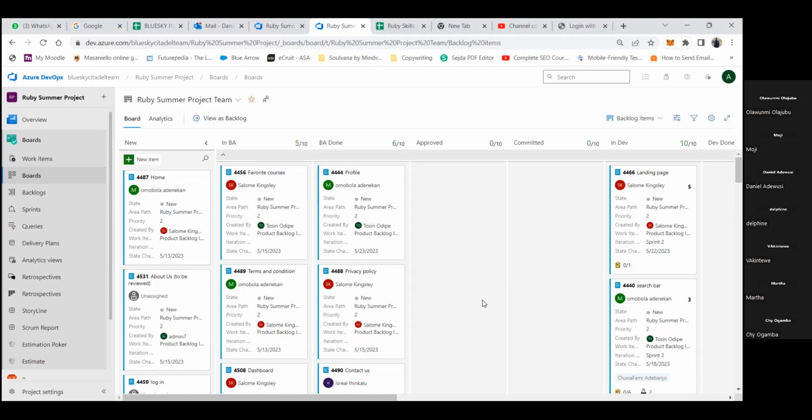Okay, that's what your automation is. And that's when you now have to decide that, okay, so for credit to go into what has been done in sprint 1, because effort has been put in sprint 1 concerning that story, that's when you do your split. If you take all that story back from your sprint 1 into your sprint 2, what you're saying is nothing was done, no effort was carried out on that story in sprint 1.